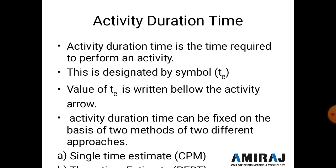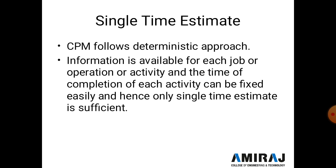Activity te time is written on the CPM diagram in the form of days, weeks, months, etc. The activity duration time can be fixed based on two methods: single time estimate and three time estimate. In single time estimate, only one time is given — the estimated time (te), where 'e' means estimated and 't' means time. In three time estimate, used in PERT, three time durations are given.